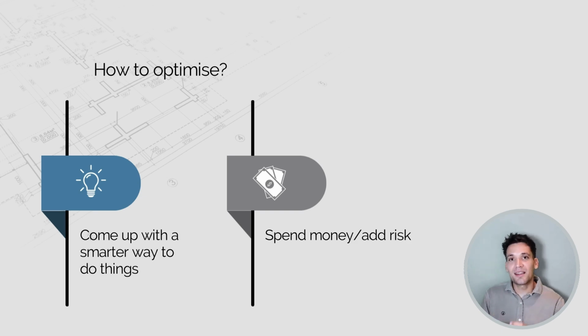Remember, the critical path is a calculation. On a year-long project, if a task has less than 10 days float, for all intents and purposes, it is on the critical path. Your schedule isn't going to be accurate to the day, so you can't confidently say that this isn't on the critical path if it has less than 10 days float on a year-long project. Again, it depends on the overall duration, proportionate to the level of float. Critical path, near critical path, in my opinion, the exact same thing.